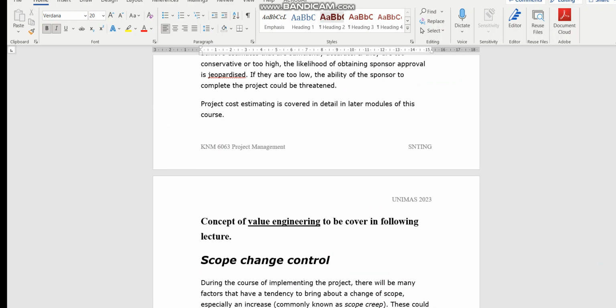And I've got 3 recordings, about 13 minutes based on value engineering. I hope we can go through that to get a concept of doing value engineering and what are the steps required to do value engineering. What must you consider when you're doing value engineering? So this bit here is very difficult if you do value engineering during construction, because things are already designed. And when you do it during construction, it's considered as a variation. It's no more value engineering. It's too late to change at that point in time.